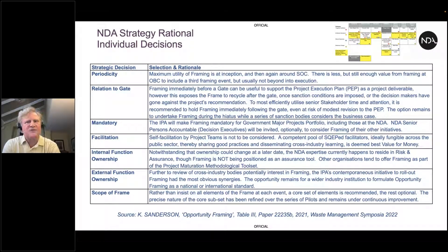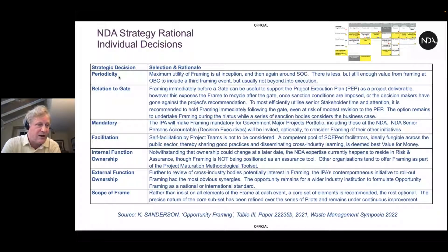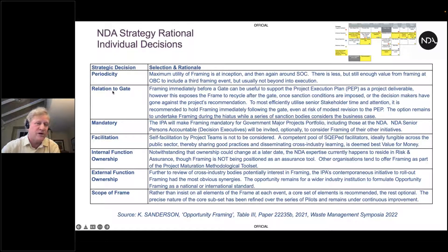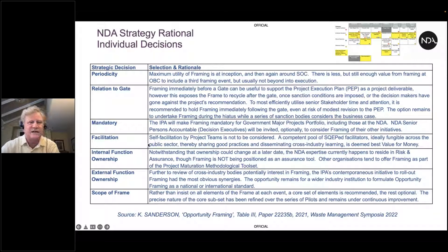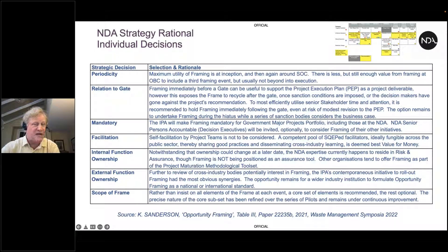In choosing the NDA's approach to framing there were real choices to make around periodicity — how often to do framing; whether it should be done before, during or after a gate; whether it should be mandatory; who facilitates it. We came down on the idea that it needed to be trained facilitators rather than self-facilitation by project teams. We actually applied the process of framing to the project of rolling out framing at the NDA and made choices. This was really the particular set of choices that we made, which we felt was suitable for the NDA.